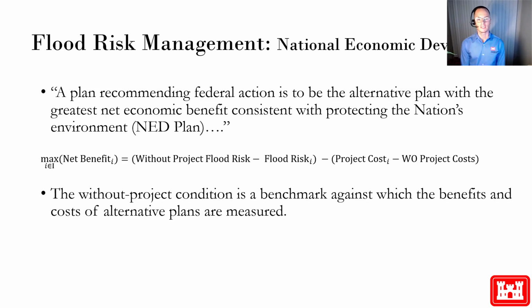Project delivery teams inevitably have to answer the question, which proposed flood risk management plan is the best? From the 1983 Principles and Guidelines, a plan recommending federal action is to be the alternative plan with the greatest net economic benefit consistent with protecting the nation's environment. We're getting at the NED plan here. This is most of the story, but not the whole story.